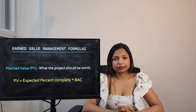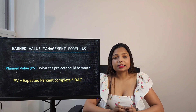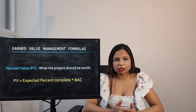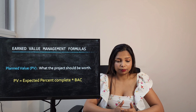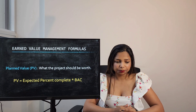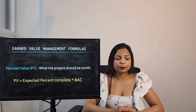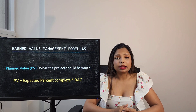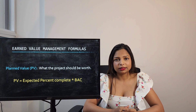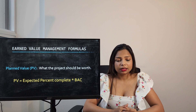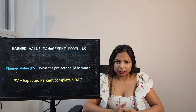The first term in Earned Value Management is Planned Value. This is the approved budget to complete the work that must be finished by a particular time — basically what the project should be worth. The formula to calculate Planned Value is expected percent complete multiplied by BAC, which is Budget at Completion.